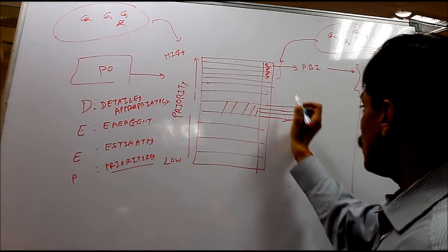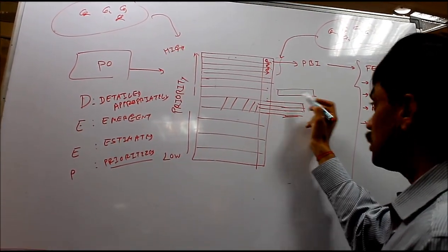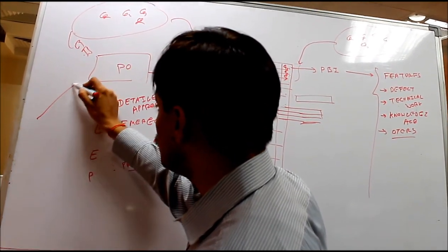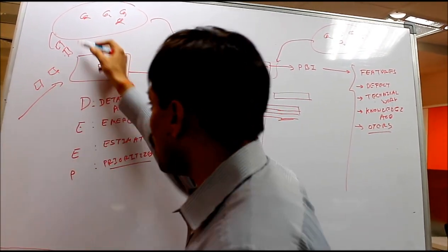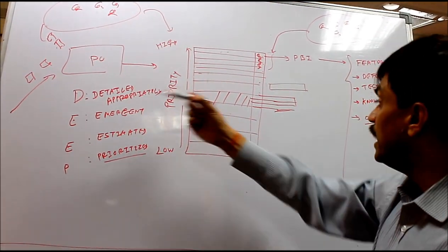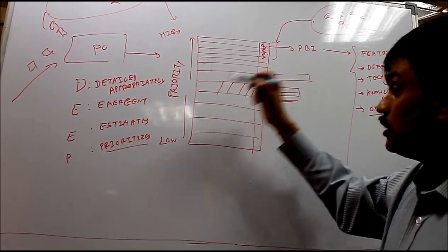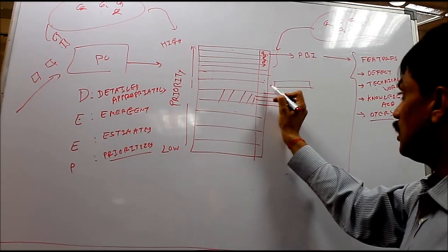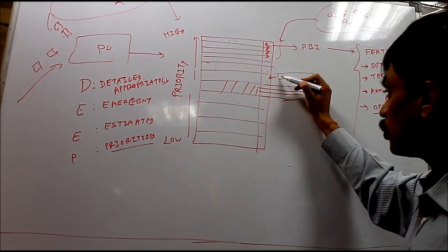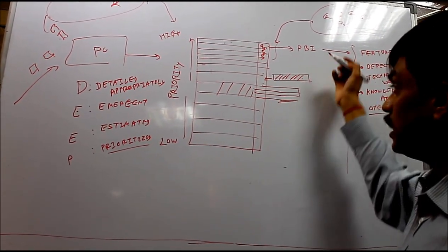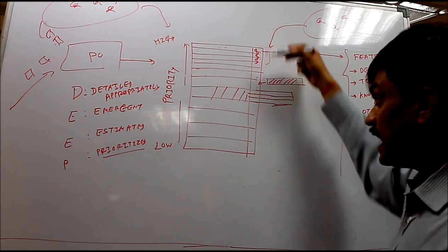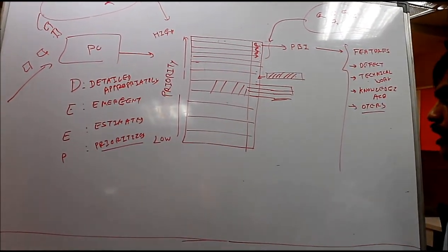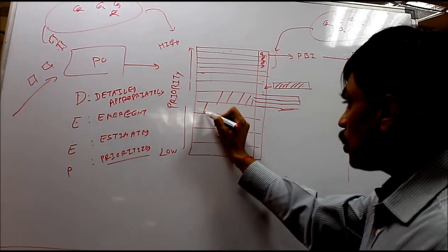The team also inserts items. The product owner may get input from the stakeholders about a new requirement, or the product owner may do his own research of competitors, and out of this research the product owner may find a new item which he wants to prioritize so the team can take it in an upcoming sprint. Since it's emergent in nature, this also falls under the grooming activity. The product owner may identify a new product backlog item and insert it at the appropriate place on the basis of priority. The product owner may decide to drop some of the items.